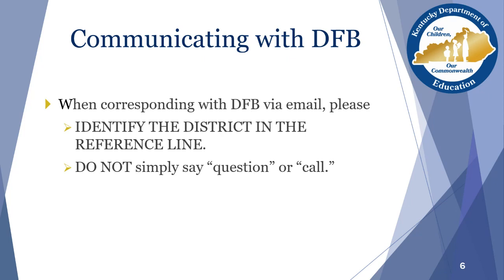The regulation overlays on top of this long-established process local board responsibilities required by statute, as well as numerous other statutory requirements regarding legal notice, procurement, performance and payment bonds, certificates of insurance, use of district sales tax exempt status, to name a few, in addition to the use of design professionals.